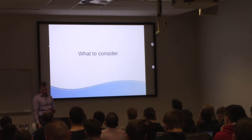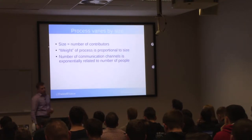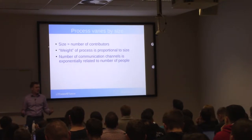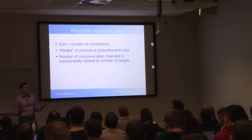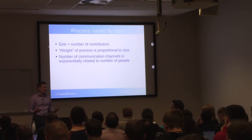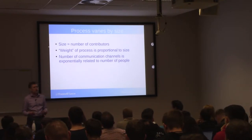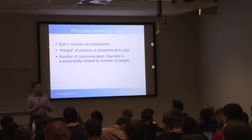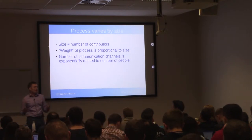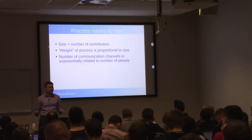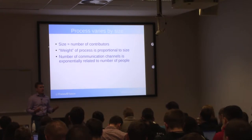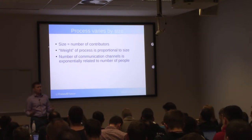What do we want to consider when putting it together? As with any process, the process you use varies by the size of your project — and here I mean the number of contributors. You want to make the weight of your process proportional to the size of your project. If it's a one-person project, you really don't need a lot of process. If it's a hundreds-of-people project, you have to have a little bit of bureaucracy. The number of communication channels is exponentially related to the number of people.